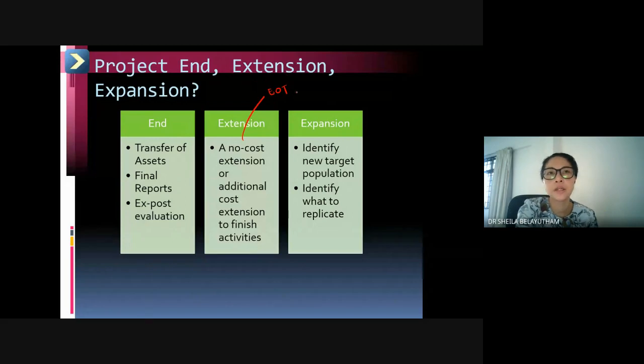Okay, mentioning the justification, and if the client accepts the justification and it is within the contract condition, then you'll be given extension of time with no additional cost, okay, to complete the remaining. But however, let's say you are actually requiring extension of time but it is not approved.